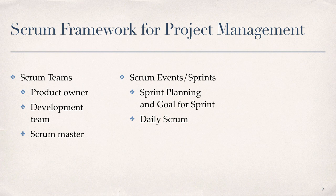The daily Scrum is a 15-minute time-boxed event for the development team, held every day of the sprint to review progress toward the sprint goal and confirm that progress is trending toward completing the work in the sprint backlog. As we do not meet every day for this class, the daily Scrum will be conducted asynchronously, facilitated by a discussion forum or other method agreed to by the team.